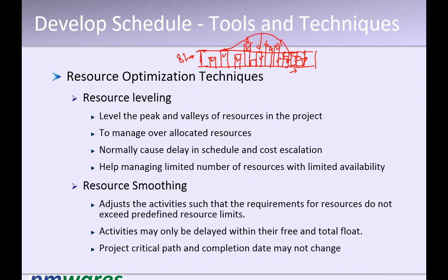Okay. How much have you worked on Microsoft Project or a similar scheduler? Do you have good experience on this? No, I have worked on Microsoft Project. Okay, so in Microsoft Project there is an option. If you go into the resource tab, there is a leveling option, and in those options, you will see there is an option available to do leveling within the available float.